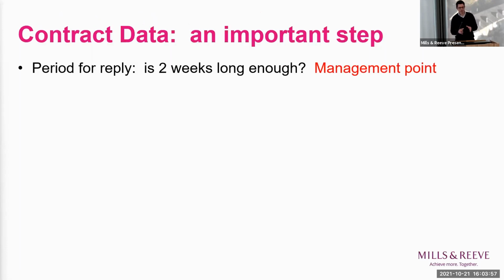And a few examples of things hiding away in the contract data. One is the period for reply. Generally, the NEC prefers things to be done within a fortnight, a 2-week window. That might not be long enough for some of the knottier issues which you can come across on the NEC project. So think about whether 2 weeks is long enough.